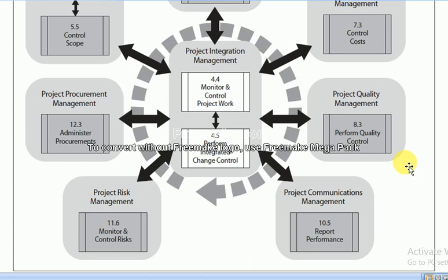Seventh step, dear students, is to approve or reject the changes. The project monitoring and controlling process may approve or reject the changes. Changes are evaluated by the change control board. A project has a board for accepting the different changes during the project work.